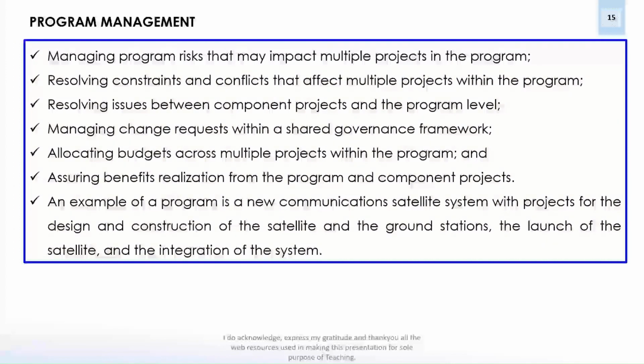Very simple example. You have a program for a township, correct? But the environmental clearance for making the township is still pending. And the project started, the subcomponents of the program started. And suddenly one fine morning, you don't get an approval from the environmental authority to construct the township over there. So it is impacting the whole township. It is impacting all the projects initiated, the subcomponents of the program initiated.